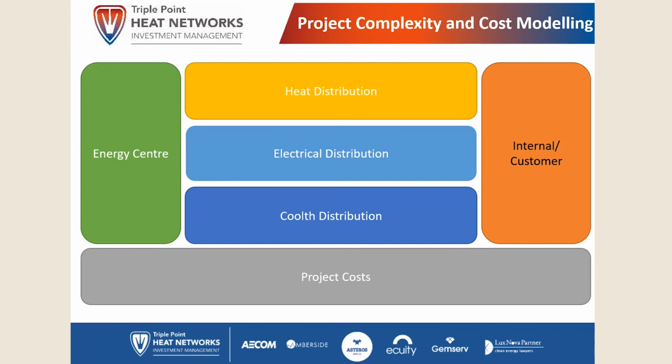This is probably the hardest category for us in terms of the way people represent things. Quite commonly we will find that the capital cost for a piece of plant will include project costs, or people will have already added risk to all their individual cost items, so it's not an item in its own right.